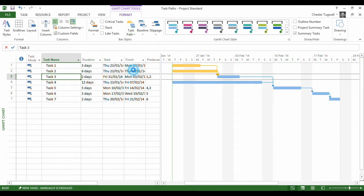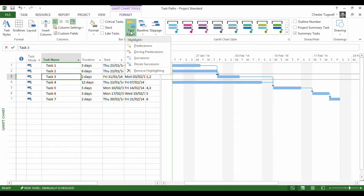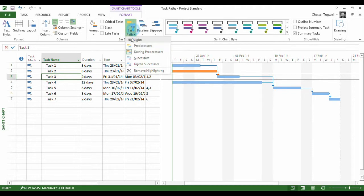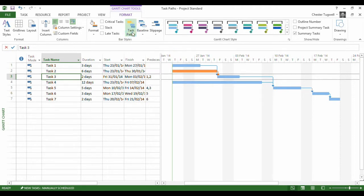I'm going to remove that highlighting. What if I go for Driving Predecessors? Well, you can see that only one of them actually gets the highlight when I choose this option, Driving Predecessors.